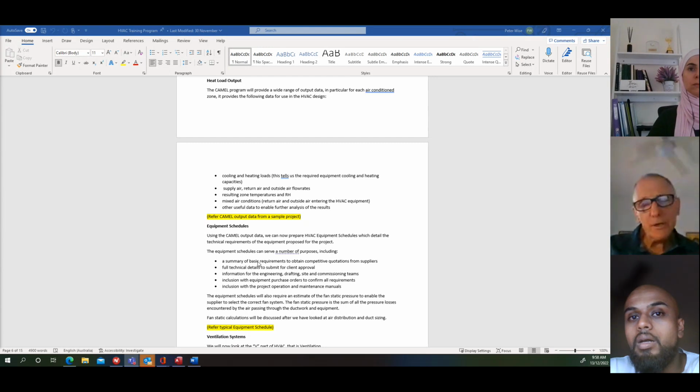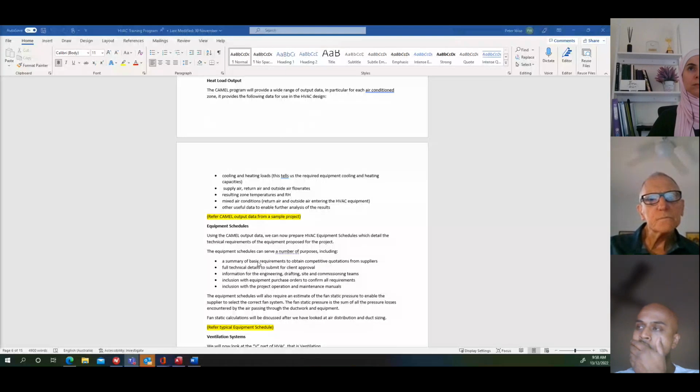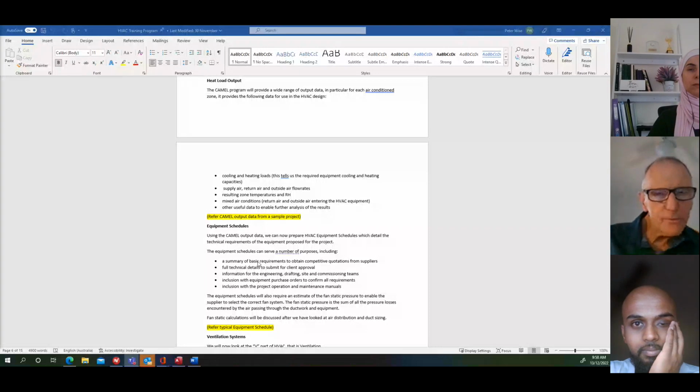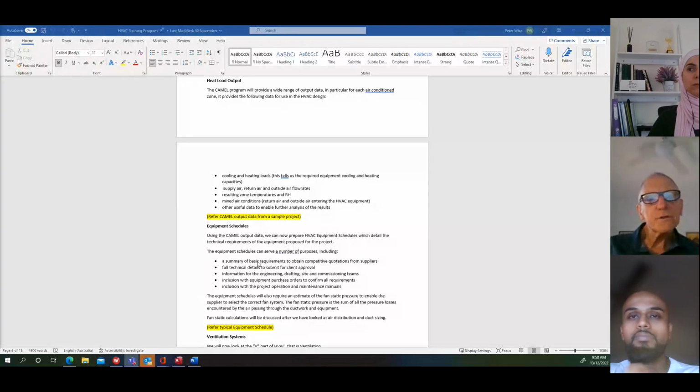I'm actually talking from the point of view of a contractor here. This is something that we do for a contractor. And then the contractor would include the schedule with the purchase order, just to confirm to the suppliers what we're asking for. During construction, there might be some changes. Some units may be changed, some may be upgraded. So things do change in the course of a project. They don't always change, but they can. So the equipment schedules need to be updated with any changes.